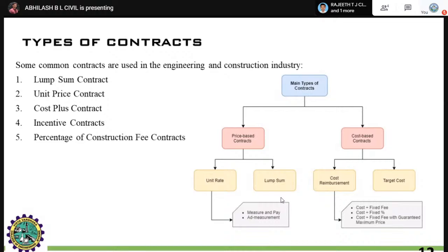Here it will vary from 50 for the works up to 2000, right? And 100 for works up to 2000. Similarly, 1 lakh up to 1 crore. Like this, it will vary with respect to the earnest money deposit. Similarly, the security money: you have to always keep the security money of some percentage of your particular project for the stakeholders' account, right? Like this, there will be some security amount. Next is arranging of the contractor. All these depend upon your particular tender notice.